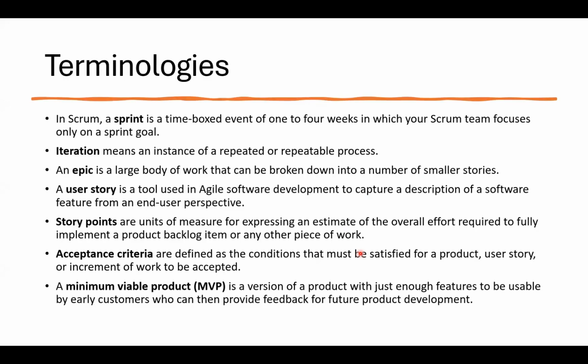Let's talk about terminologies, buzzwords, things you need to know, things that should just be at your fingertips. Number 1, sprint. So that's a time-boxed event, 1 to 4 weeks, in which the entire team focus on a sprint goal, what they set out to achieve for that sprint.